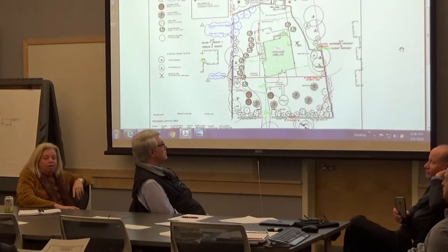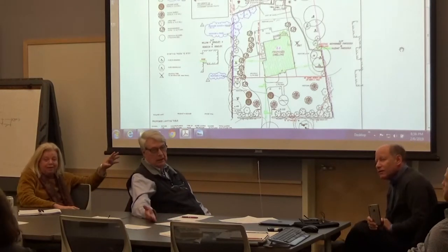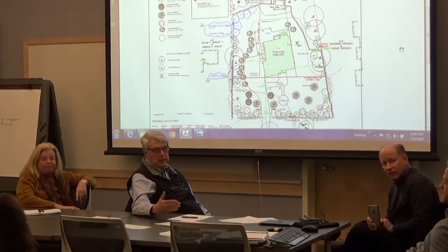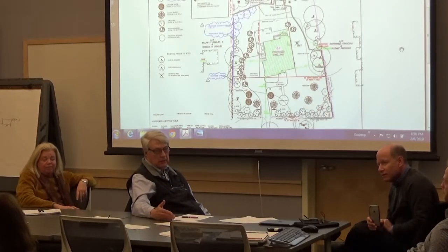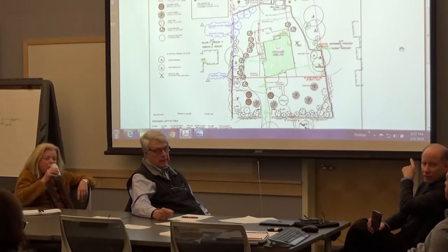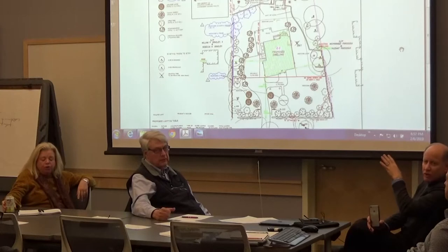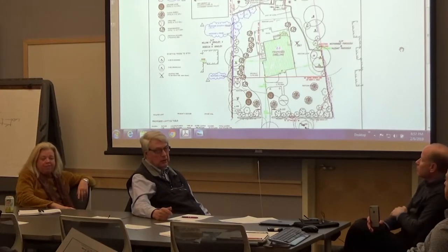No, so the homeowner did send over a plan that shows the difference in square footage. But that's not what we're looking at, so there's another plan. Can we actually get a plan submittal that shows exactly what's going to be there when the dust settles? And we have to compare it not with this plan, but with the original plan we approved. Then we have to decide which elements we're going to sign off on. Maybe all of them, maybe not, I don't know.